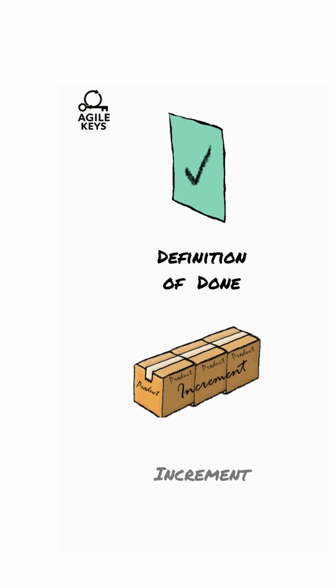The final commitment is the definition of done. This is a list of quality gates that, when a product backlog item reaches, becomes an increment, or a series of product backlog items. And the increment is the artifact attached to the definition of done, the actual piece of deliverable value that is going to the stakeholders.